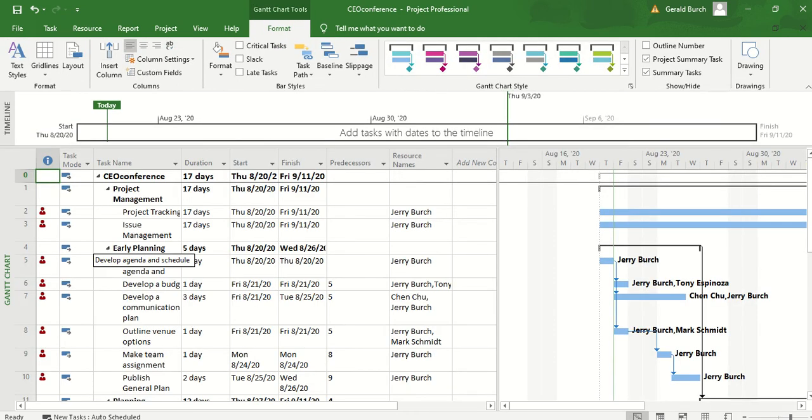the way I have my Gantt chart set up, and yours is going to be different than mine, this is all going to be accomplished in 17 days. So there's no way on earth I'm going to be able to get all 450 hours worked in those 17 days. So I have two options. One, I can try to offload some of my work, or I can go in here and extend some of these tasks so that I have more time to get them done.